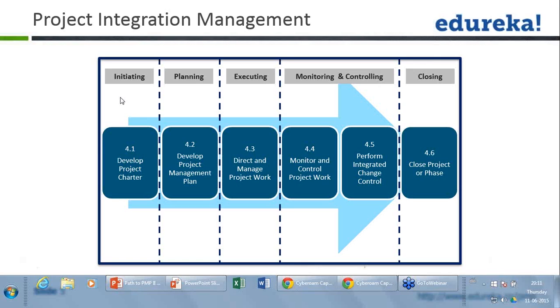The key output of this process will be a decision on whether we need any corrective or preventive action. So you do a sort of variance analysis here. During executing, the team will do the work and we will get the work results. Those work results will be compared with what was planned, and if there is any deviation, the team will take a decision whether to make some corrections or take some preventive actions or not.